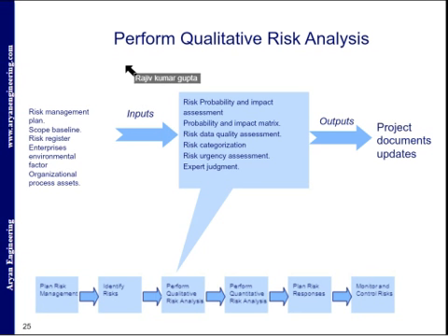That's why I said it's very easy to say risk averse. That means I don't want to take risk, but there is always some risk in the project or in the organization. So would you want to do something about all risks identified? Of course not. That would be too expensive, or we would not have enough time, because either it would be expensive or it will take a longer time to avoid the risk, or maybe it's not possible.